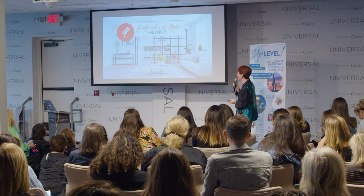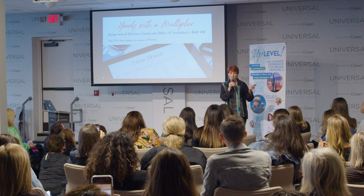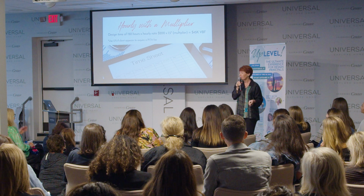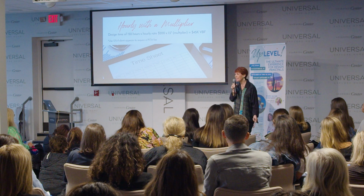This is more of a check and balance thing. By the way, those of you that are less than $200 an hour in this room, I automatically bring you to $200 an hour. It's just easier to do math that way. So I recommend just move up to $200 an hour or three. Three's good too. I take your design time, however many hours, times an hourly rate, times 1.5. Now, why did I pick 1.5? Because I know you're undervaluing by at least that much.